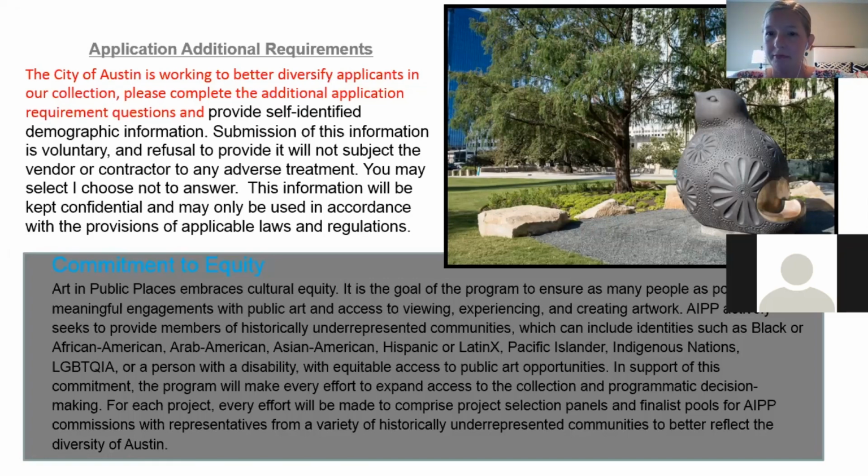Okay. And then our next one is, what will the payment process look like, as artists coordinate things like schedule availability, insurance, and supplies? Maybe when payments go out could be a good way to help, or benchmarks. Sure. The City of Boston contracting process is through milestone payments. So we don't pay for things ahead of time, and we can't pay for 50% of a project before 50% of the project is complete. So we set up milestones, and when we're writing the contract, there's a negotiation period where we go back and forth about if these milestones are going to work for you.